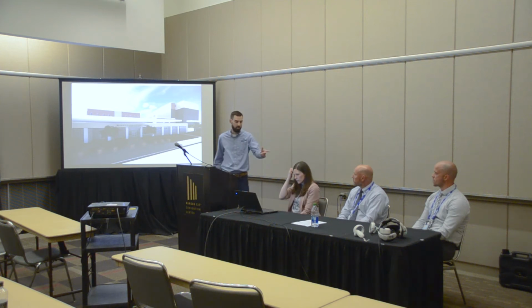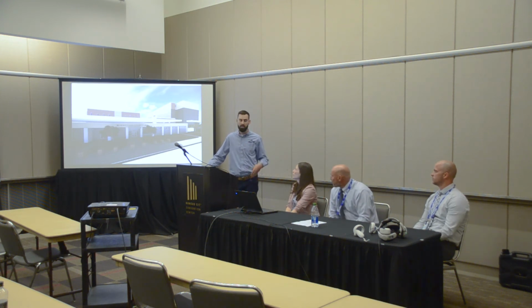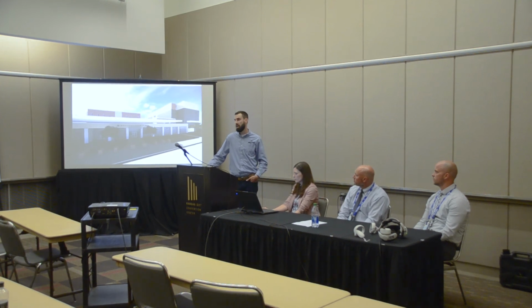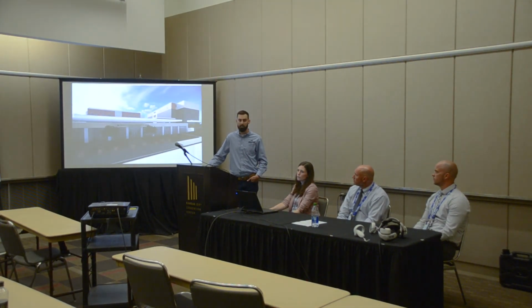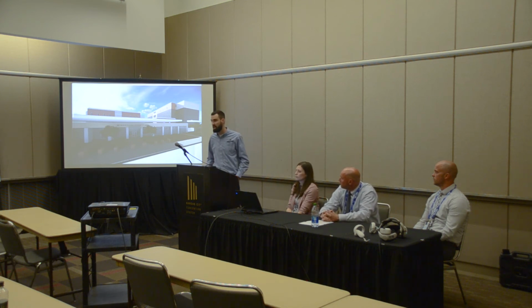Yeah, speaking of engagement, Jeff obviously has a very busy day job being the warden at the time. But we had weekly construction meetings with the designers, the architects and the owners. Jeff had multiple people from Minnehaha County with him. So having those weekly meetings and having them really actively engaged really helped the project go very smoothly. And we were able to solve a lot of issues right away versus over emails or phone calls. So I highly recommend if you're ever building a project, regardless of who it's with, be engaged, be active in decision making, make decisions quickly. It will save a lot of headache and quite frankly, it will save the project a lot of money too.